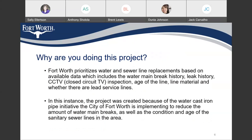We have questions that we're going to post that most people would ask. Why are you doing this project? Fort Worth prioritizes water and sewer line replacements based on available data, which includes water main break history, leak history, CCTV inspection — which is when we put a camera into the pipe to tell us the condition of the pipe — age of the line, line material, and whether there are lead service lines. In this instance, the project was created because of the water cast iron pipe initiative the city of Fort Worth is implementing to reduce the amount of water main breaks, as well as the condition and age of the sanitary sewer lines in the area.